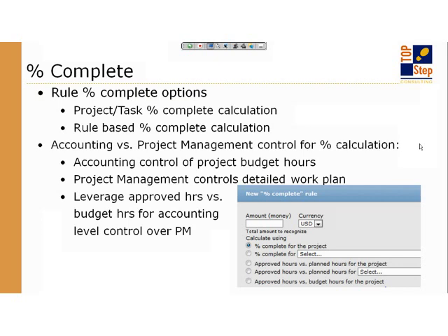And an interesting one, just to call your attention to it if you're not aware of it, there is an option for you to just do a very simple percent complete of the approved hours over the total budget hours on the project, which is on the project properties form or the edit project form, depending on your UI. And that budget hours is something that if you want to adjust percent complete, you could always adjust the budget hours. It's a one value change. You don't have to update tasks or anything like that. So this is sort of in a pinch trying to fix the percent complete rev rec rule, but it is an option. It's the simplest way to do percent complete, and it doesn't require a lot of calculation.